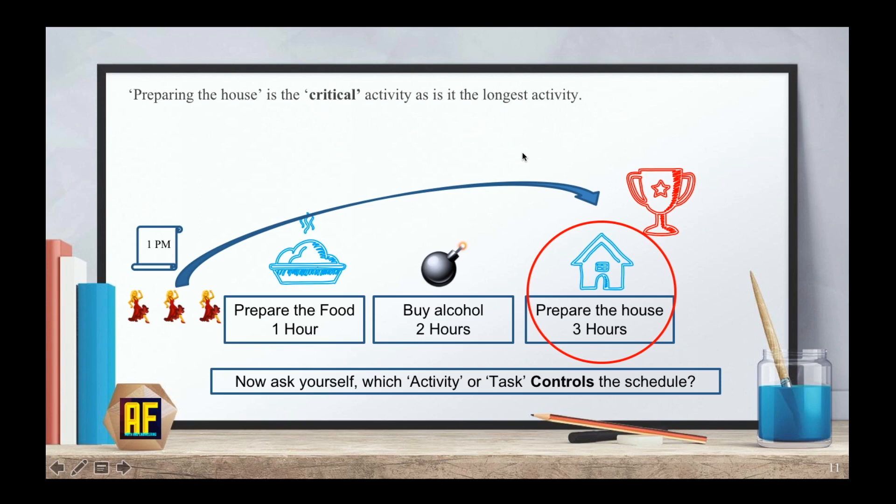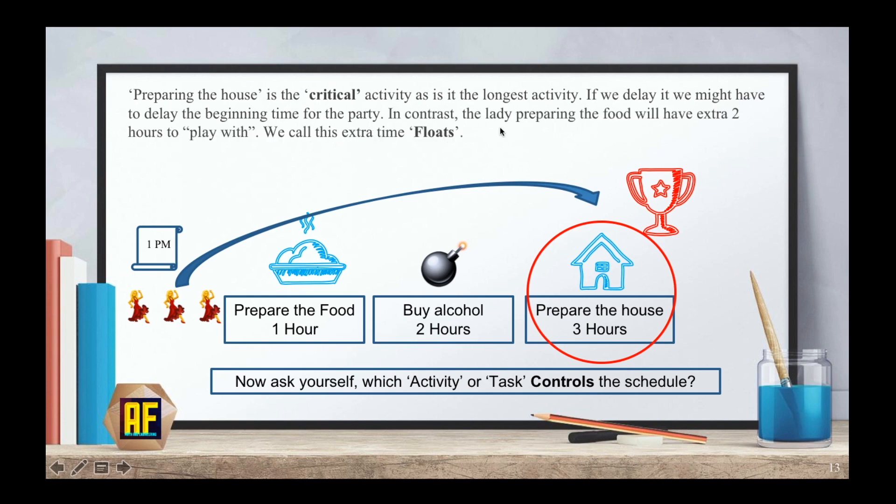Which is the most critical from those 3 activities? And the answer is this one. The person preparing the house needs to start at 1 and finish at 4. And if she will start at 2, it means that the party can only start at 5. While the person preparing the food, they can start at 2 or even 3 and still finish at 4 o'clock. That's why this task controls the schedule. Preparing the house is the critical activity, as it is the longest activity. If we delay it, we might have to delay the beginning time of the party. In contrast, the lady preparing the food will have an extra 2 hours to play with. We call this extra time floats. In this time, she can choose to start early, start late, finish early, or finish late, as long as she does not go over the time agreed to start the party.